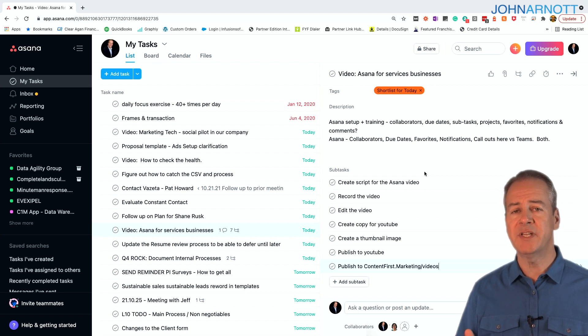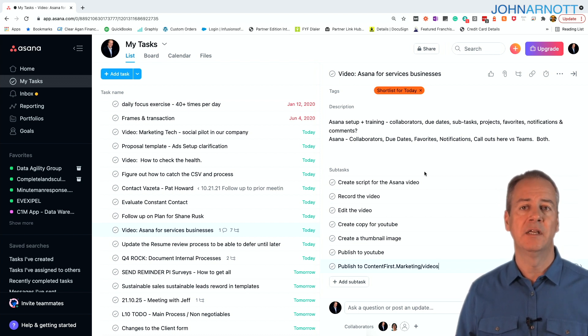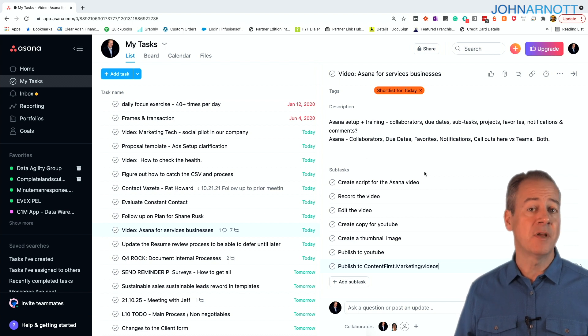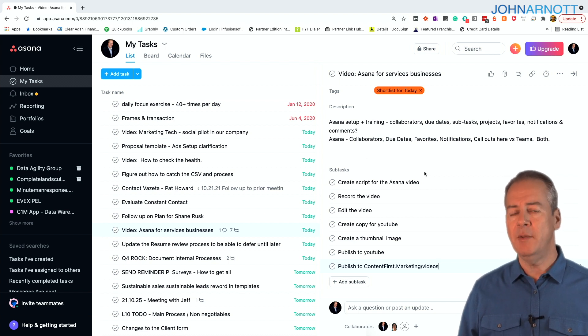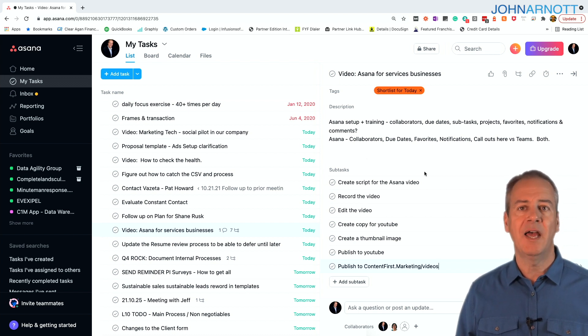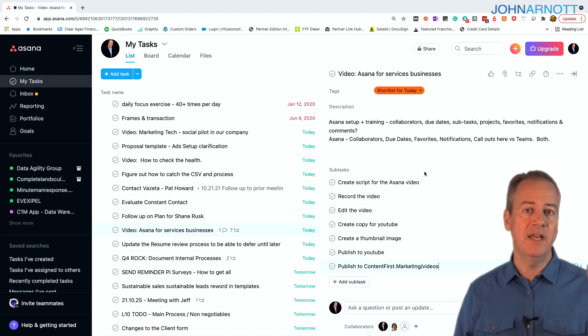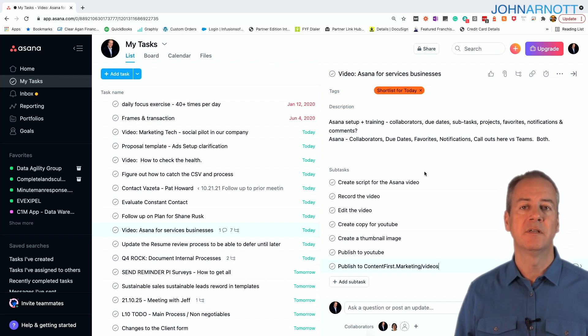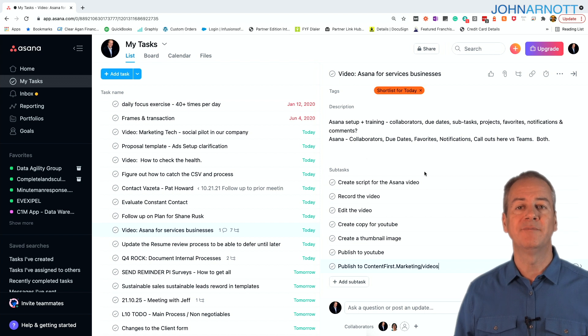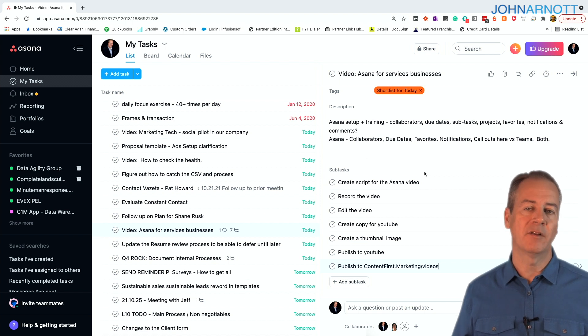These things are all very important steps. If I just had this as a single task in Asana, that would be fine, but something could get dropped. If I use subtasks, I can then break this down and assign each person their individual parts. And then when all of those are complete, I can mark the main one complete.